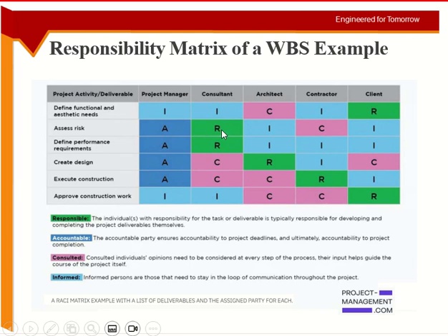So the responsible person needs to seek the consultation. He will go after the people who will give him the data, because in the end he is responsible, and the information should not be before the approval. Okay, so in this chart you can see that all activities do not need all the roles to be fulfilled. For the first line and the last line, you do not see that all roles are fulfilled. And the last line again, you only see information, consultation, and responsibility.